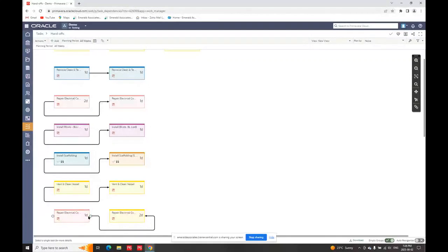So you may not have one that is finished to finish, but you may have one that's finished to start, that kind of thing. Colors make it very visual to see it's two contractors. Whatever the connection is, you absolutely cannot miss the fact that it's showing you if one task gets delayed, you're impacting the next task, and it's another contractor. It's not your own people. So you need to have some conversations around that as well.